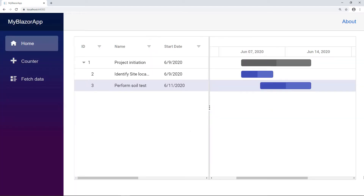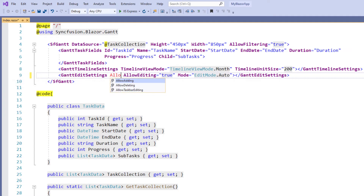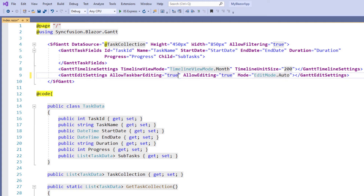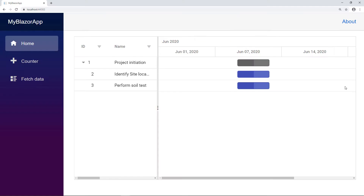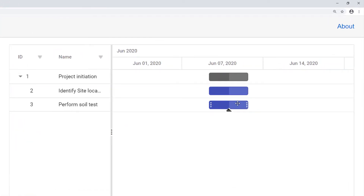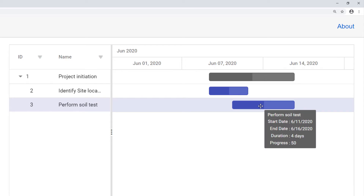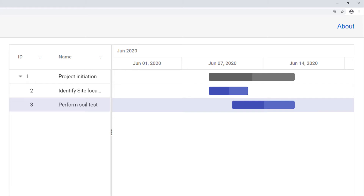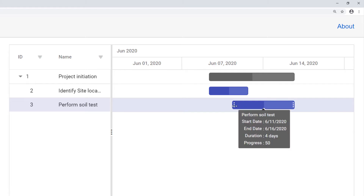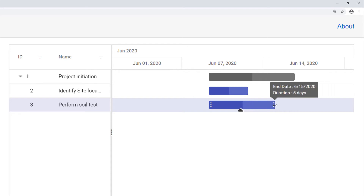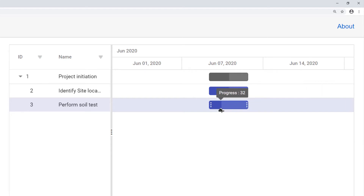Now let me show you how to edit a task using the taskbar. In the Gantt edit settings tag, I add the allow taskbar editing property and set the value to true. I run the application. When I hover over the last row's taskbar, you will notice the kebab menus at the start and end points of the taskbar. I can select the taskbar and drag to change the start and end dates. You can notice the parent taskbar also changes with respect to the child taskbar. Also using the kebab menu, I can change the start date and end date of the task. Using the progress bar navigator, I can change the progress value for the child task, and the parent task's progress also changes with respect to the child.